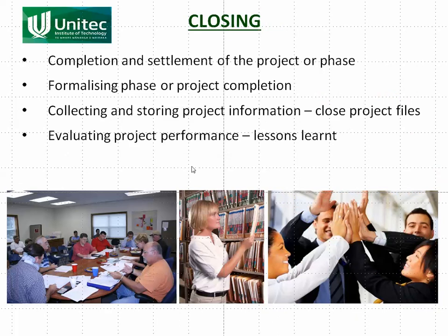Once the project is complete, you need to finish it off. It's not a matter of, okay, we just finished this road and you walk away. You need to have a formal handover, where you hand the project over to the client, and the client says, yes, that's what I want, thank you very much, gives you a final payment, and the project is complete. You also need to take the information from the project and store it.